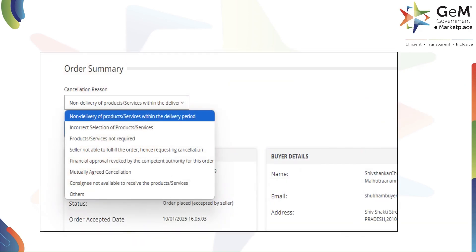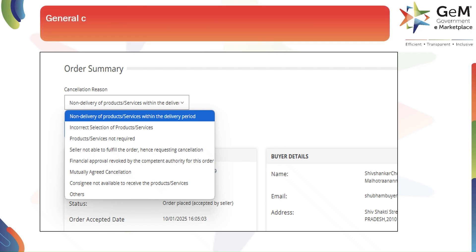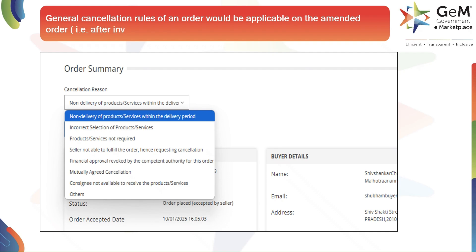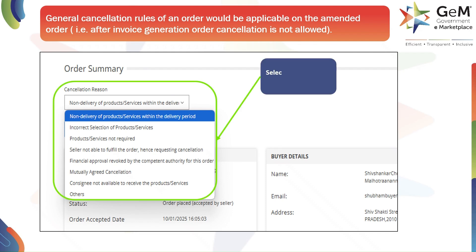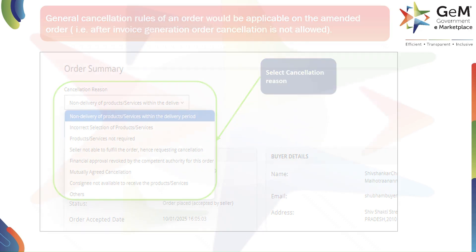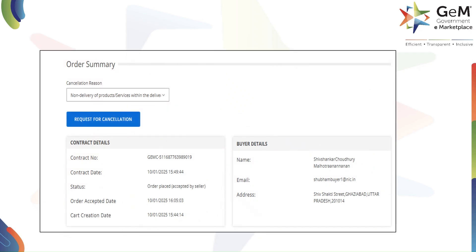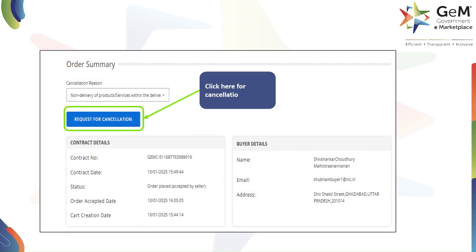General cancellation rules apply to amended orders, but cancellation is not allowed after an invoice is generated. You can select a reason like non-delivery or mutual agreement. Select the cancellation reason to request cancellation and click here to cancel the order.